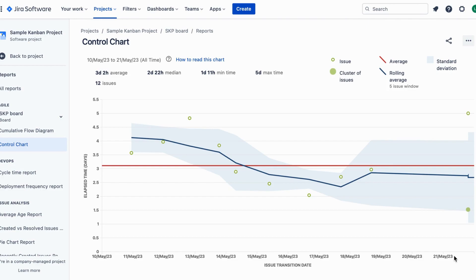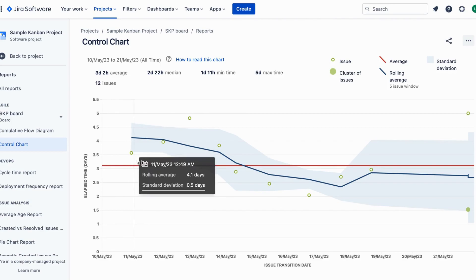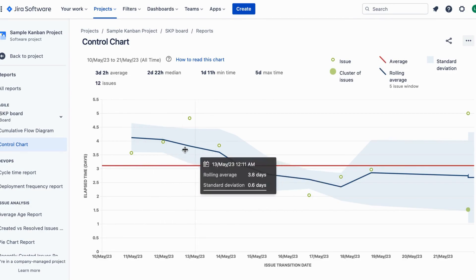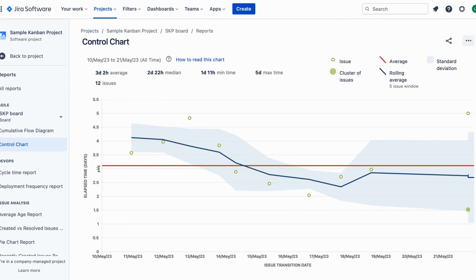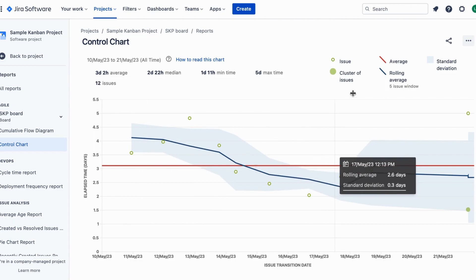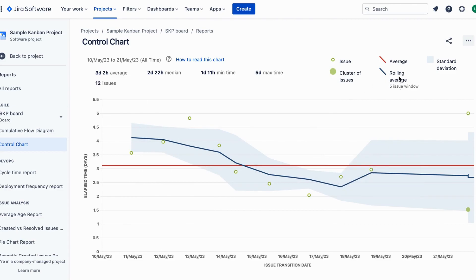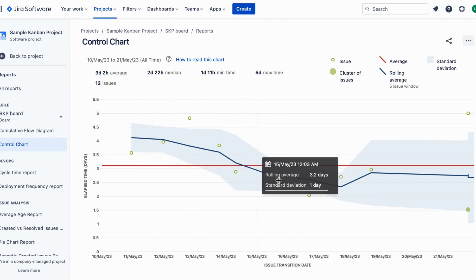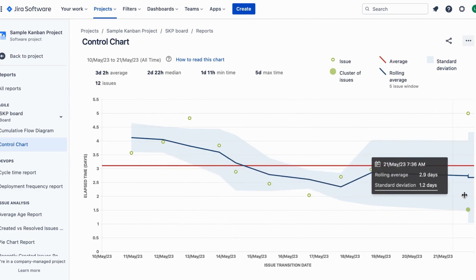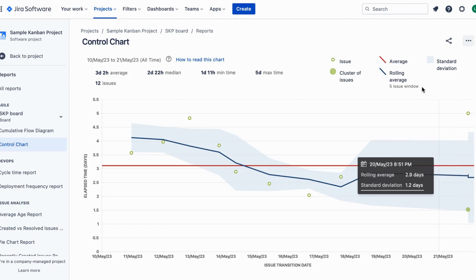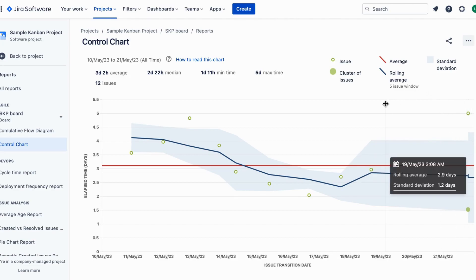Now let's take a closer look at some key features of the control chart. The red line represents the average trend, showing the number of days an issue needed to go through the workflow. The blue line represents the efficiency, and whether the rolling average indicates process improvements and increased throughput. The bluish cloud is for predictability — a narrow standard deviation through process improvements may improve predictability of cycle time.